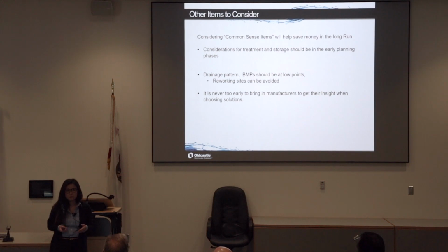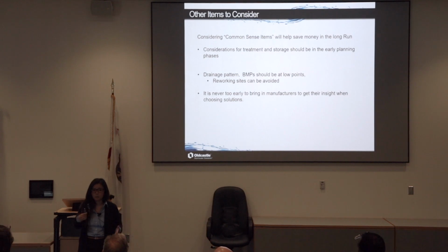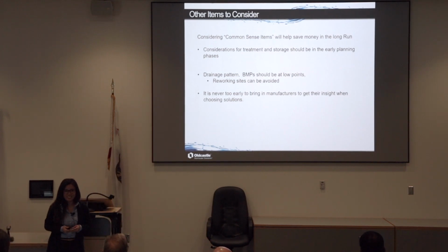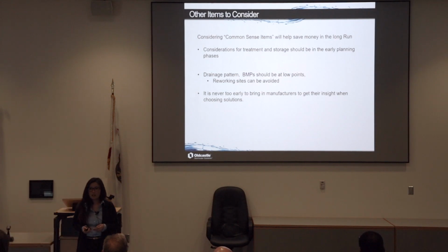In those cases, it would have been better if we had seen the plans in the beginning of the design phase rather than the construction phase, and then the owner gets to avoid reworking the design and going through RFIs and costly changes.